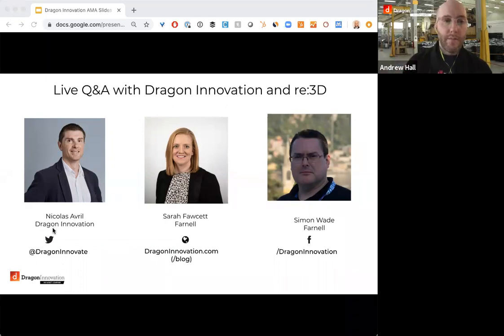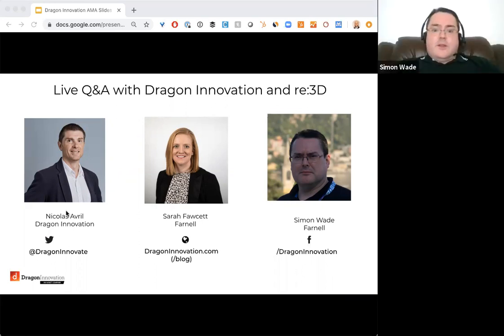Just to jump off to the next question, I feel like that can piggyback off of that. With part selection to minimize costs, is there a risk of those parts becoming obsolete? I don't know if Simon or Nicolas want to jump in. I think there is always a risk of parts becoming obsolete, and that's again one of the benefits of using a product like the Raspberry Pi. There are established second sources for every single component on that PCB, together with a guarantee almost from Raspberry Pi themselves that they will keep that product in production for 7 years minimum. Ideally, they'd like to keep it in production for 10 years.